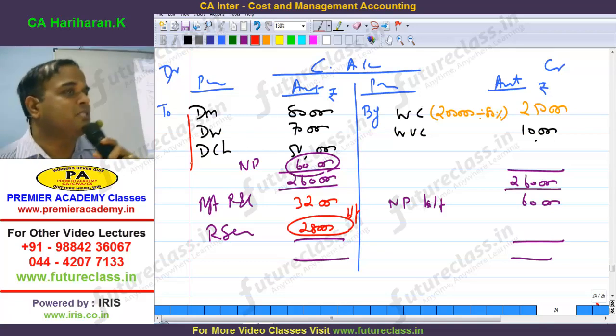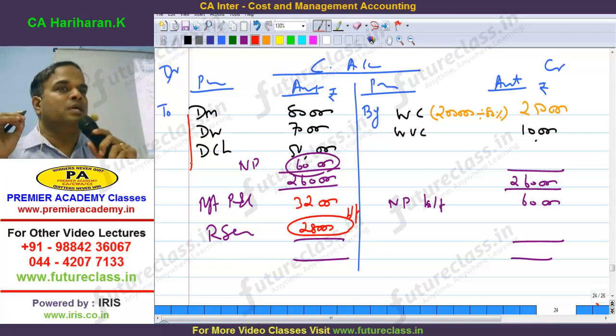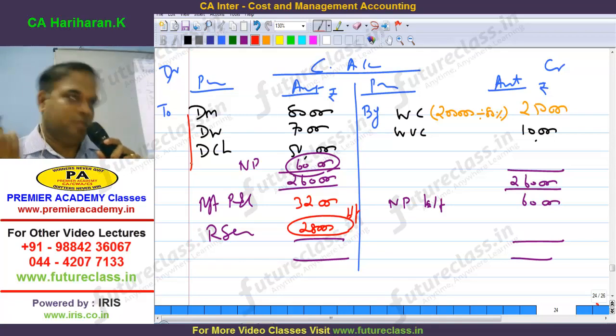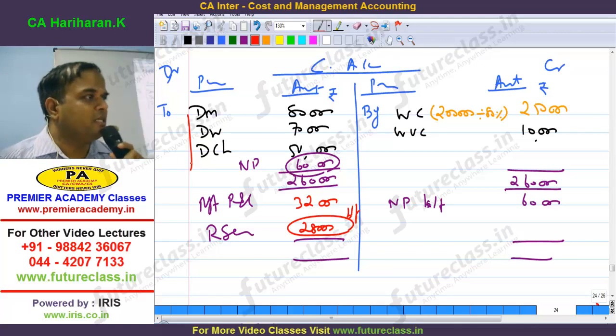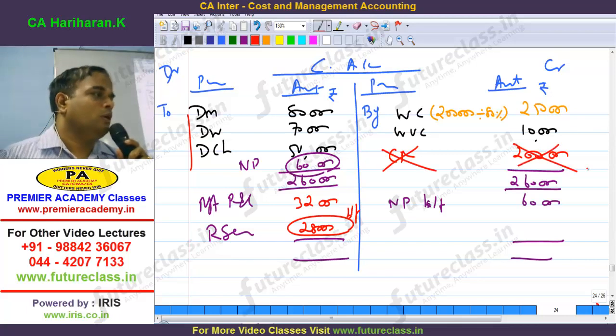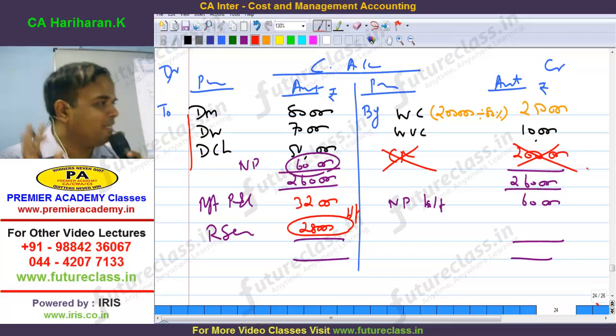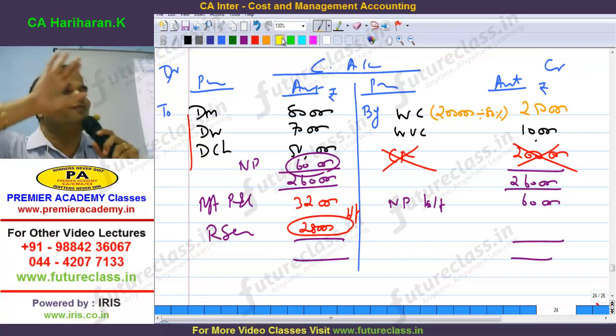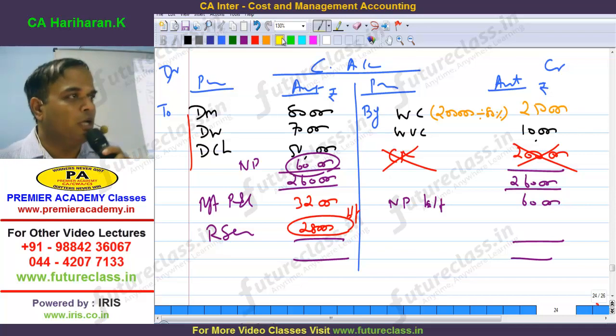What is the commonly committed mistake? Cash received. Income or expense? Income, there is no doubt. Debit side or credit side? Immediately, cash received, the 2 lakhs. Cash received will not form part of the contract account. Wait, clear? Cash received will not form part of the contract account.